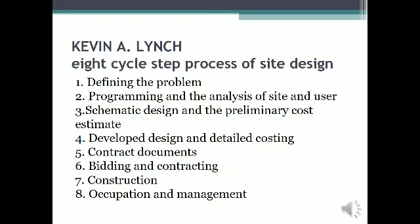Kevin A. Lynch's eight-cycle step process of site design: One, defining the problem; two, programming and the analysis of site and user; three, schematic design and the preliminary cost estimate; four, development design and detailed costing; five, contract documents; six, bidding and contracting; seven, construction; and eight, occupation and management.